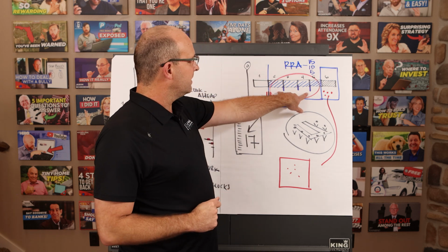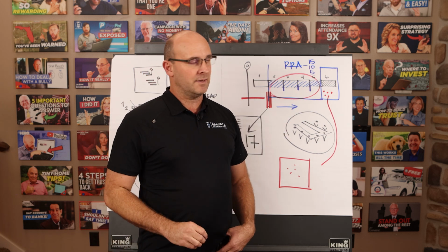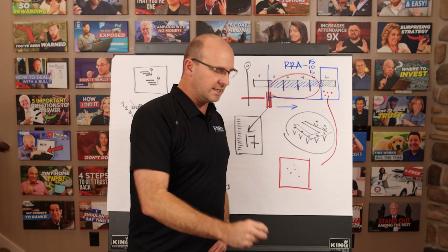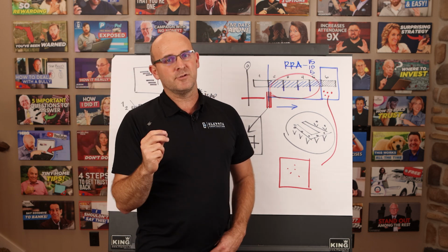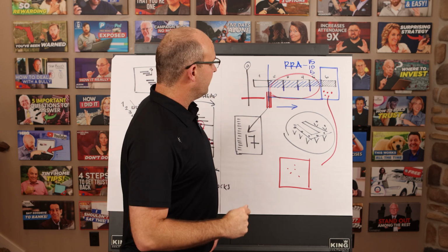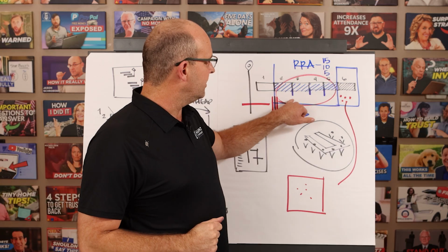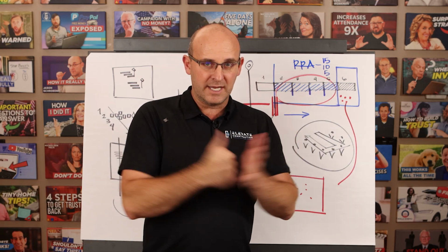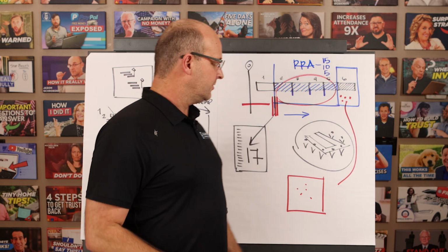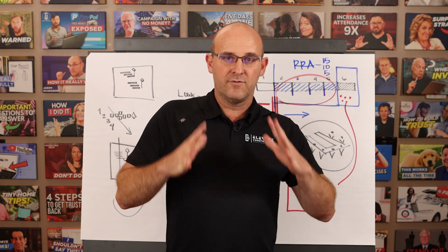And if you are spending most of your time, that means 80% of your meetings, on roadblock removal, that means in your strategic meeting, in your trade partner weekly tactical, in your daily foreman huddle, 80% of the meeting is on removing these roadblocks together as a team, you're doing it right. And if you have +5 or better, that means you are removing roadblocks before impact on average. Sure, some are going to slip, but that means you're doing it right. These are the non-negotiables for look-ahead planning that I want for you.